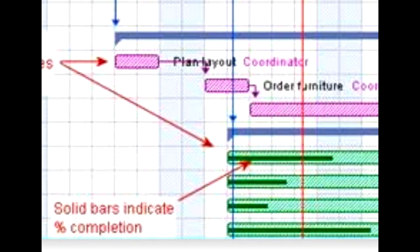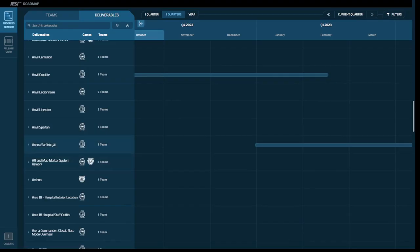The Gantt chart includes a marker, either as a tick marker or nested bar, that shows actual completion, and thus an indication of progress as advancement towards a destination. And then there are examples of tasks that actually reach their destination, but can't be ready.